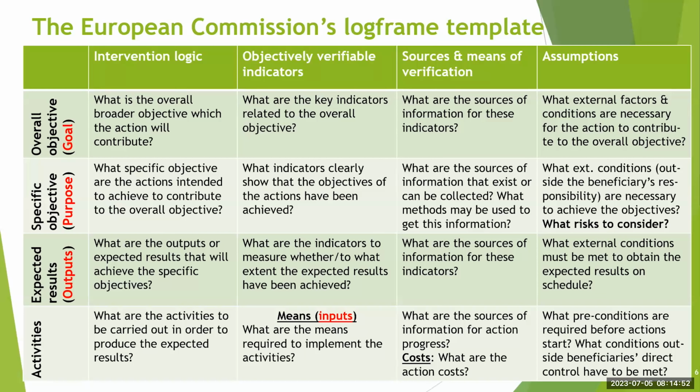And then before you can deliver the outputs, you would want to decide what activities would be required for us to get that done. Of course, there will be some survey to check the traffic volumes. Some designs will be done, some construction will be done. These are the activities that would be carried out in the project to deliver the output of signalizing the intersection, all with the purpose of making sure we reduce the travel time through the intersection.